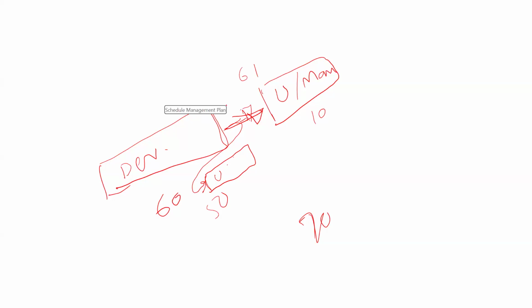Yeah, there is an overlap you are getting. This overlap is called lead. Lead and lag are opposite of each other. Lag means there is an intentional gap. Lead means there is an intentional overlap, which is very commonly used for several things. We people use it without even thinking about it.